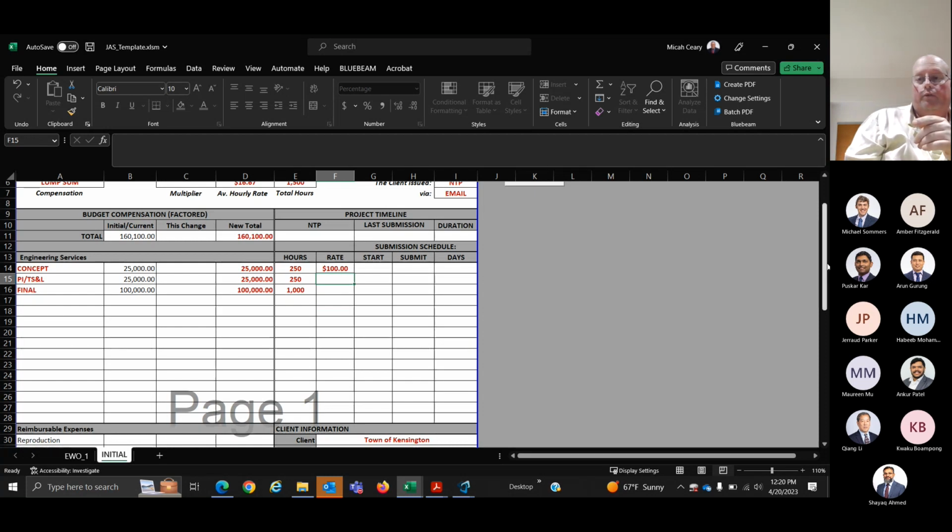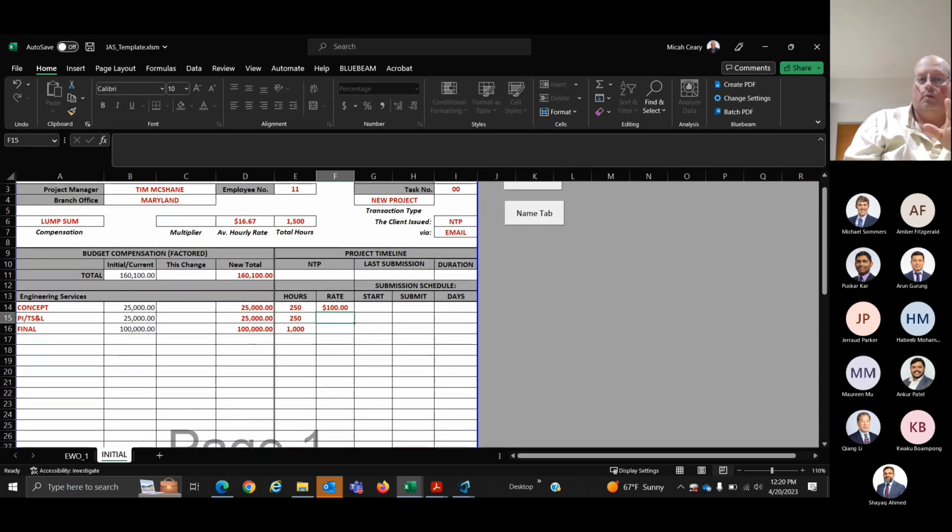And the rate there, we have 2 different types of contracts. There's some that our rates are based on a fixed rate, so it's a factored rate. We can use a factored here, or we can use an unfactored and have the multiplier up above. Of course, they're average rates, since there are multiple people working on the job. It's like when we do some of these Maryland jobs, which is foreign to me from working in Virginia. We end up at an average rate at the end, which VDOT would never allow. VDOT is very different.